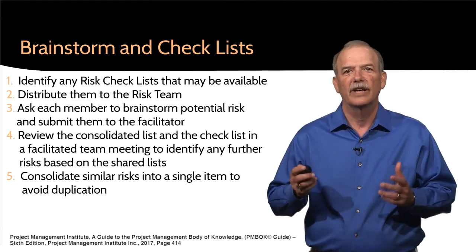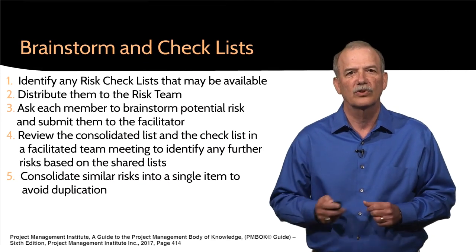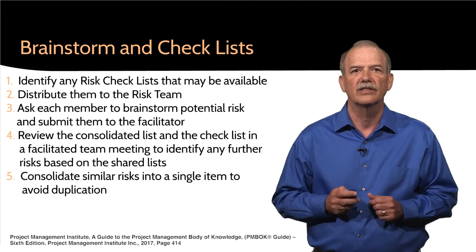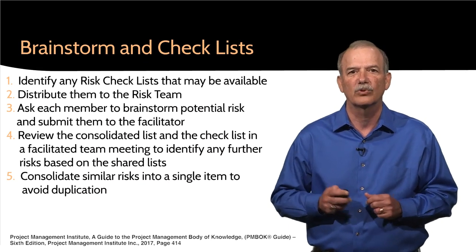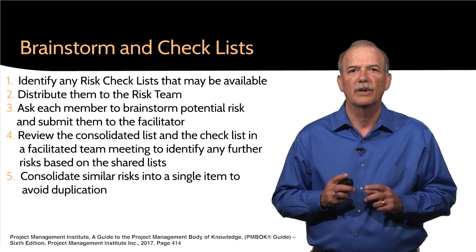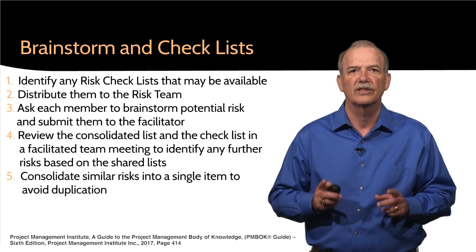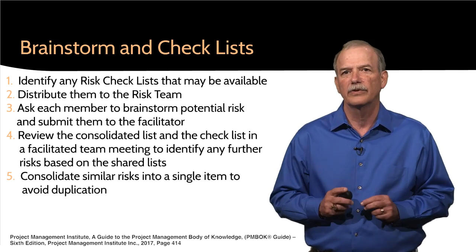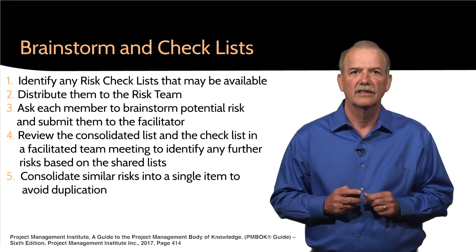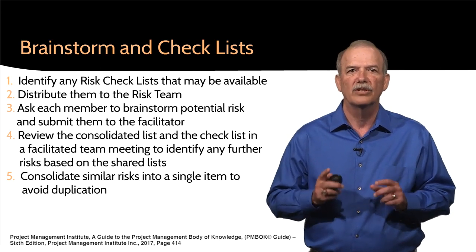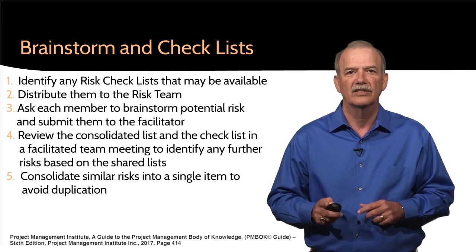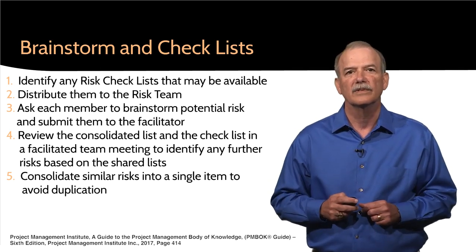After we've gathered this available information from established sources, the next step is to gather a group of stakeholders and others with knowledge of the industry to have a facilitated brainstorming session. The goal of this process is to develop a long list of potential risks to the project's success and opportunities for improvement, no matter how remote, and then add them to our database. It is important to make sure that we include people who understand the business case and the market conditions as part of this effort.